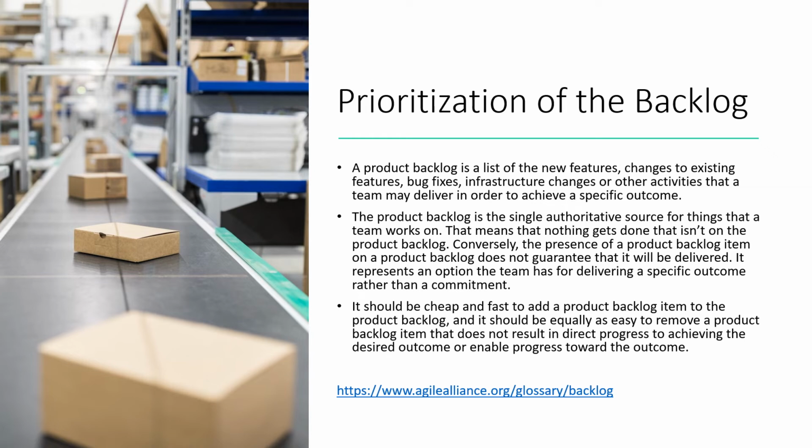One of the main responsibilities of a product owner is to prioritize the requirements, which are kept in the backlog. You can think of the backlog as a stack of note cards with the requirements written on them. Each note card, or each item in the backlog, represents a specific requirement or task needed to be completed during each sprint. The product owner is responsible for deciding which are the most important ones to move to the top of the stack for the iteration. It is essential that the product owners are aware of the most valuable requirements and tasks, so that these are prioritized highly and can be given the most attention and the highest urgency.